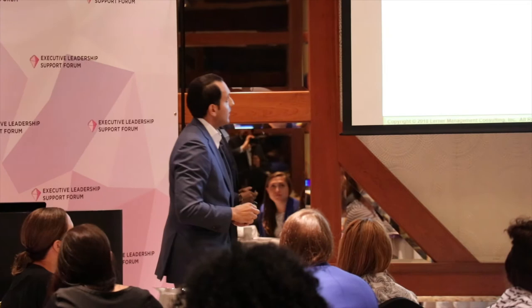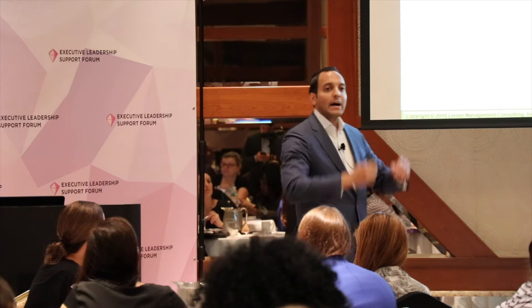So remember, we talked about the build, the test, collecting requirements. Those could be your milestones. Collect requirements complete. The build of X number of work units complete. Test 55 documents complete. Those would be more your high-level milestones. Think about a birthday, that's one day, a significant event. Your wedding day, that's a milestone, not a discrete task.